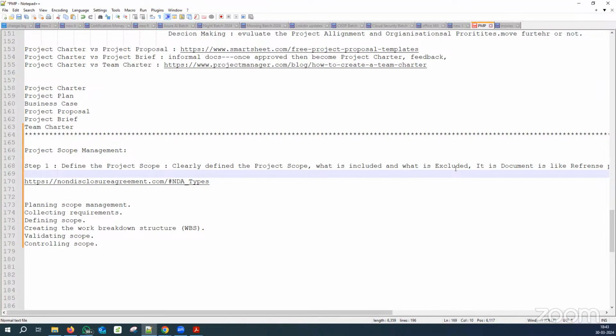If you complete the first floor, that is the money. Second floor you complete, that's the money. If you complete the flooring area, that's the money. And if you complete the whitewash of the house, that's the money. Okay, so we have step one, step two, step three. These are the different types of steps we discuss.